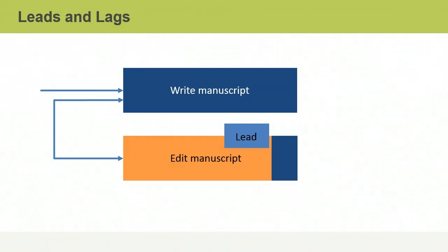Two more tools and techniques for developing the schedule are leads and lags and schedule compression. Since they are related, they'll be covered together. A lead occurs when an activity can begin before a predecessor activity completes. For example, an editor may edit a manuscript chapter by chapter instead of waiting for the entire manuscript to be completed to save time. The start-to-start relationship between these activities creates a lead.